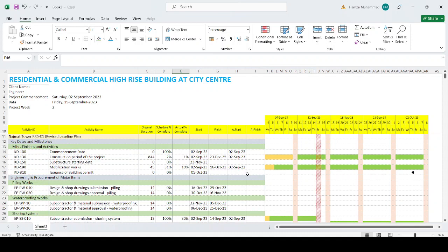and it may be helpful for you in future to make a small Gantt chart for a small period. This is a good technique, but unfortunately conditional formatting is not good if you have projects of long durations. For example, if you are going to make a project for 2 years, we can make it, but we cannot print it properly in Excel, so it is not readable or recommended.